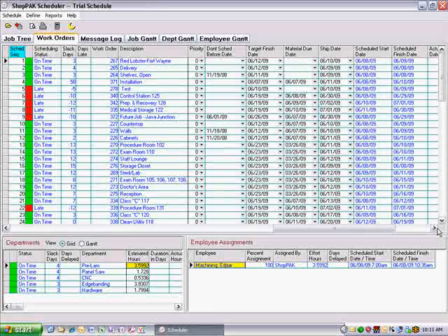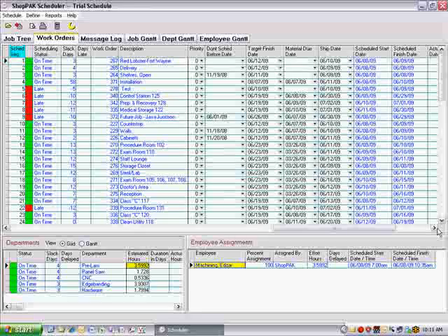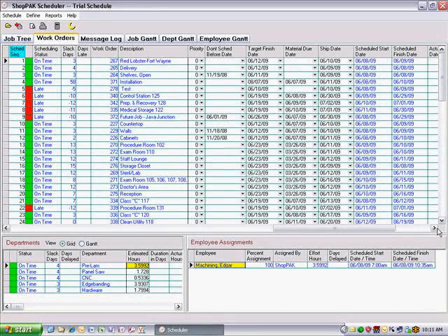The main reason to nail work orders is to reduce the number of active work orders in your scheduling list. Once you run the scheduler and assess the results, you can nail work orders whose dates meet target finish dates. This is critical if the work order has 0 or just a day or two of positive slack time, since subsequent scheduling runs may cause an on-time work order to become late. Essentially, nailing work orders that you're satisfied with lets you focus on work orders with problems or that have sufficient positive slack time to allow them to remain in the scheduling queue.